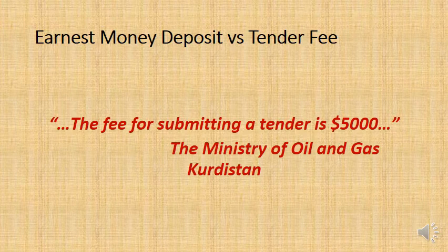But not only that, Cardo is thinking, I only have a 1 in 5 chance of actually winning the project, because I know Avan, Yar, Lausanne, Taba, they're all submitting tenders as well. Therefore, I'm running a risk. And remember what we learnt about? If there's higher risk, you want higher profits. We learnt that in engineering economics. It's 101.